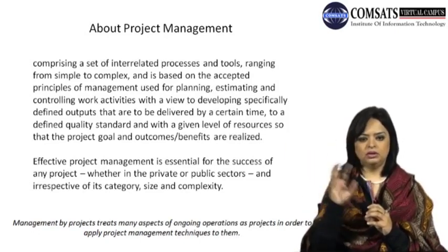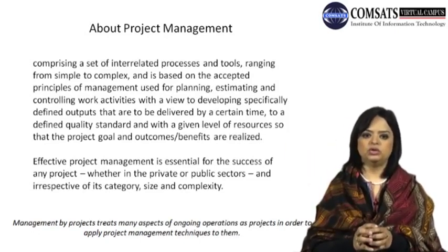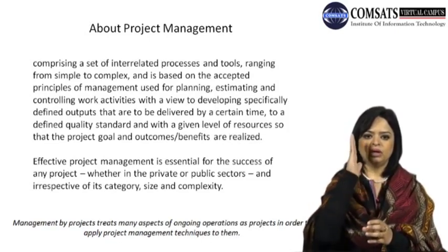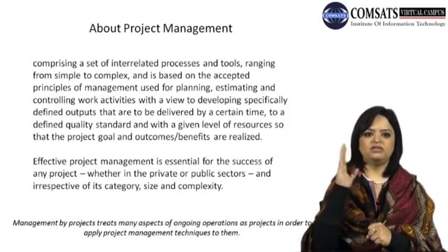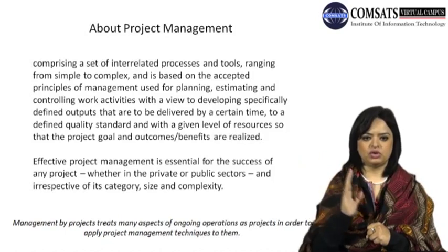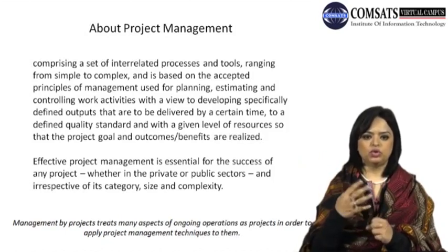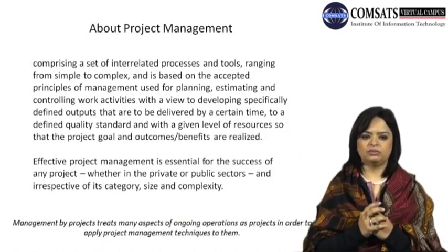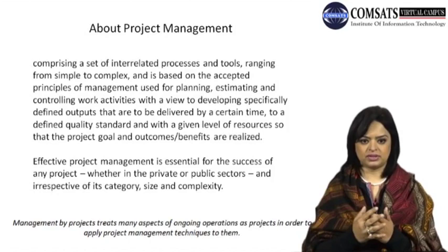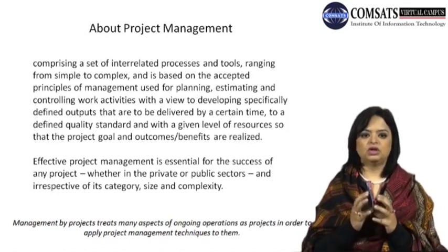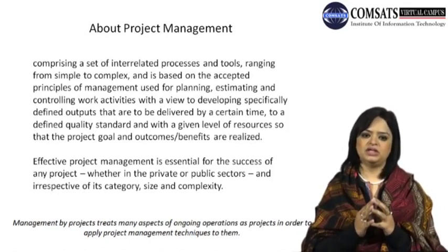So one is the normal movement going into the closure phase. A sign-off is needed from every phase, movement from every phase to another phase. So there's a mutual understanding that the project is progressing at the right pace. No matter what phase the customer or your project organization decide not to progress further, the closure phase activities need to be dealt with at that point in time.